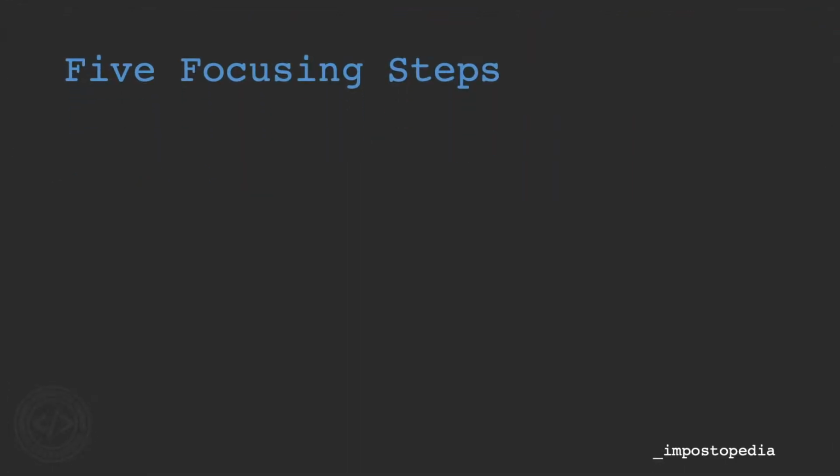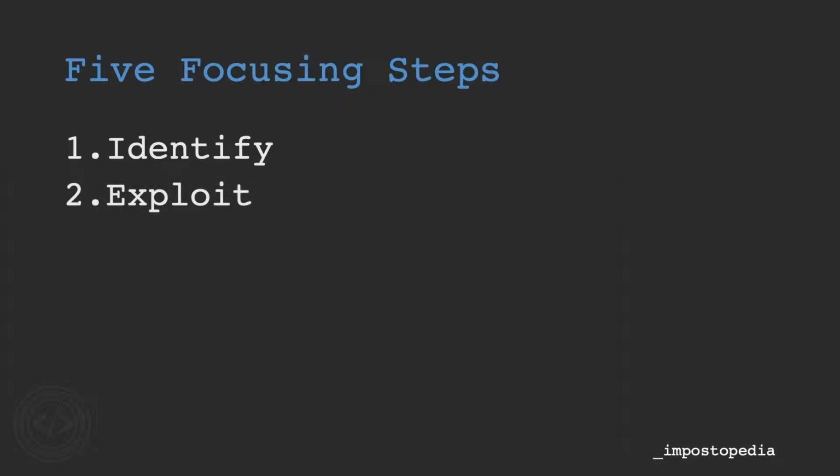The theory of constraints provides a set of 5 focusing steps designed for identifying and eliminating constraints within a system. Step 1 is to identify the most limiting constraint, the one that bounds the performance of the overall system. Step 2 is to make quick improvements to the throughput of the constraint. This can be thought of as making the most of what you have. Are there any obvious measures that can be taken to prevent this part of the system being the most limiting constraint?